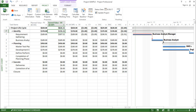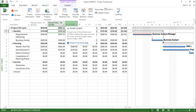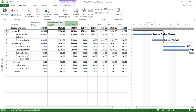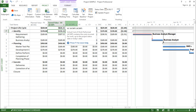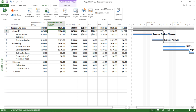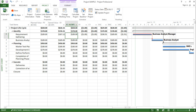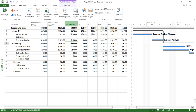Moving on, the next column says Actual Cost. The tooltip reads: 'Actual Cost of Work Performed — ACWP — contains the cost incurred for work up to the project status date or today's date.' In simple words, the actual cost is the total cost of the resources and materials which we have specified in the resource sheet, and it has given me the value which has been incurred.